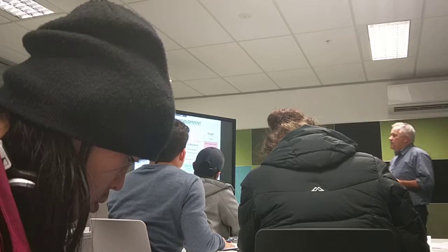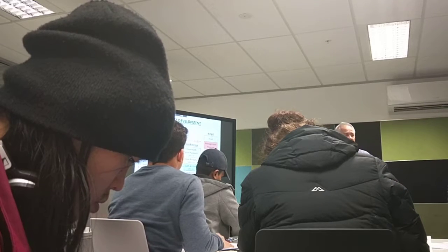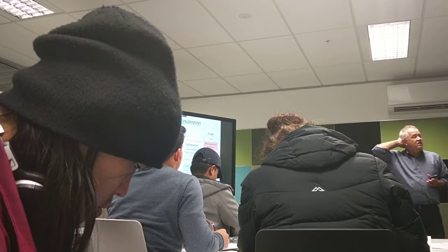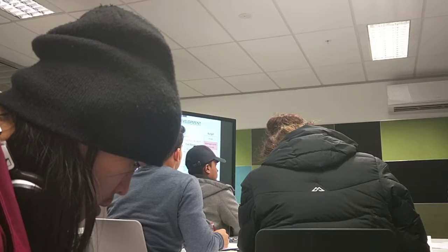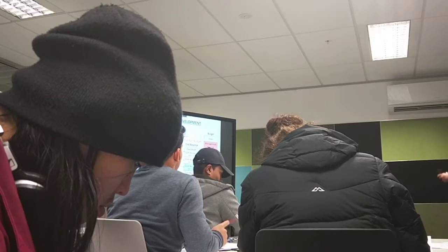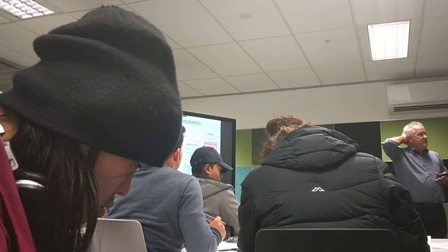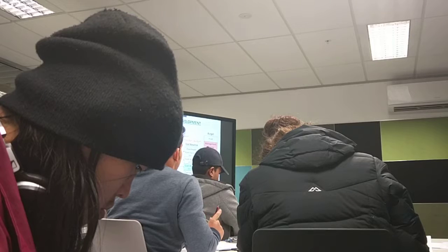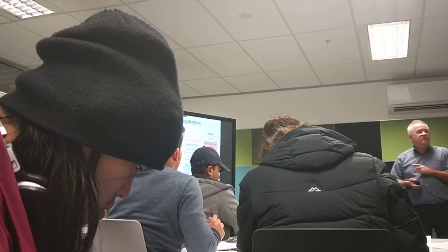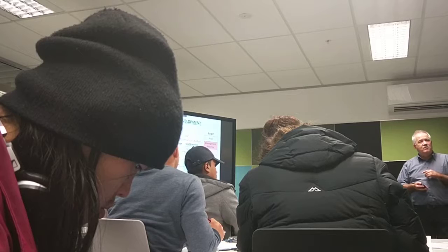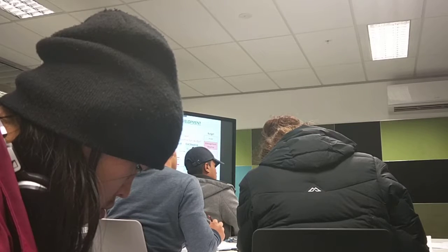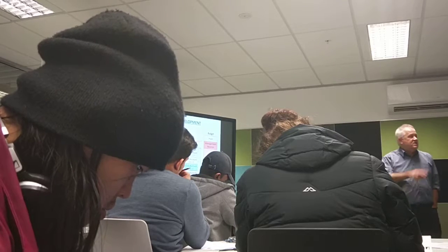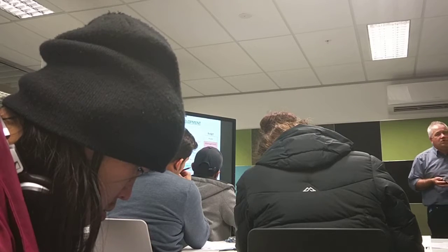The management reserve sits outside of it, so if bad stuff goes on, you've got some money to draw on, and the profit's normally not included in your budget. The profit is you bring it in for the cost plus the contingency. The profit belongs to the owner. You don't start biting into the profit, or your boss, the guy that owns the company, is going to be very unhappy. So the profit's the only thing they can adjust. They can adjust it up or down depending on whether they want the work or not.